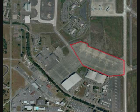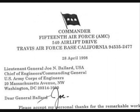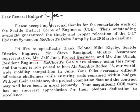The hydrant system on Delta ramp was a very critical project with no float in the schedule. The contractor, Porter Brothers, encountered the water table while excavating for a valve vault. I wrote a mod for some pumps, but the transmissivity of the soil was so high that they couldn't draw down the water level at all. To keep the project on schedule, I spent that afternoon and evening in the contractor's trailer with the project superintendent, Dennis Milligan, redesigning the piping and valve layout so that it could be built in a shallower vault.